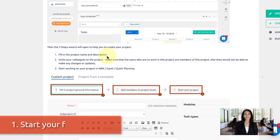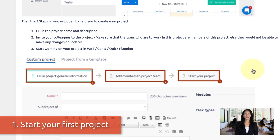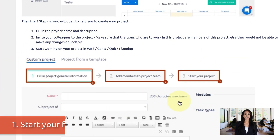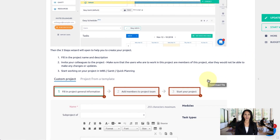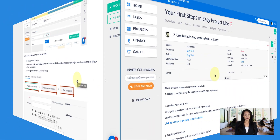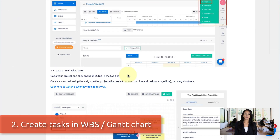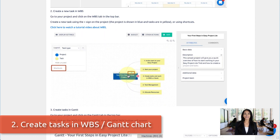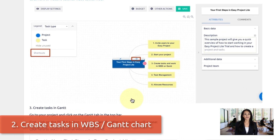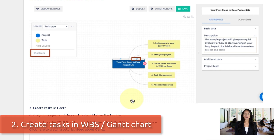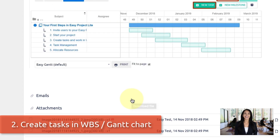Number one: start your first project — simply name it and give it a basic specification. Number two: create tasks. You can do this in WBS, which is like a mind map view and helps you create a logical structure of your project, or you could do it in a Gantt chart as well.